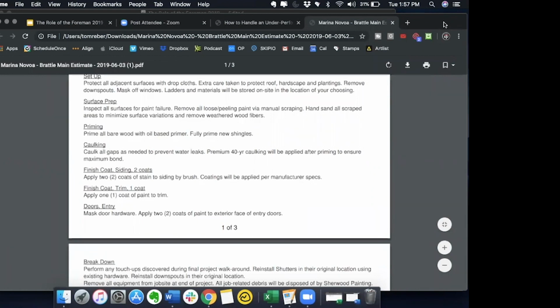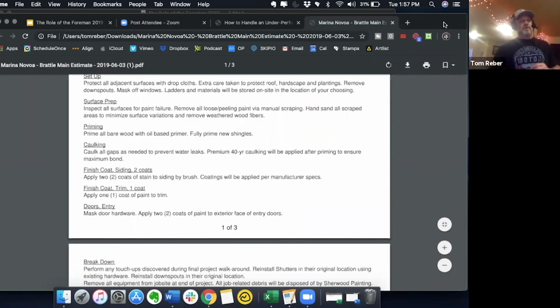So now remember, estimating is part art and part science. The art is your experience. The science is just some math. Like, hey, on average, it takes 1 man hour to put 2 coats on 100 square feet of drywall without any prep. Like that was just in our software. We just preset some of those things. And so I would write down every time you go out and write a job, start with this. If you don't want to get into the software thing and that's all overwhelming,